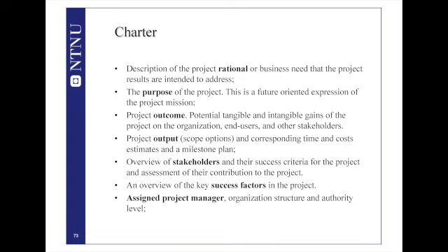And perhaps the example I showed in the previous lecture with the hospital is an example of an organization that only looked at the gains from the project. They did not address the risks. They didn't have any idea what would be the consequences on work processes, on end users, on acceptance by the end users of this particular solution they had adopted. So outcome consists of two things: gains and risks. We need to understand that.